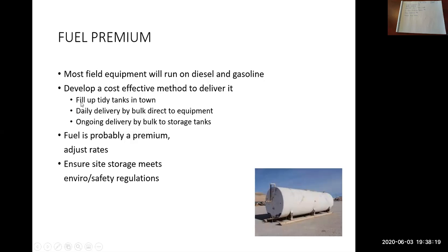So if you only have a small number of pieces of equipment, do you have a designated person with a tidy tank, as they're called, in the back of their pickup? Do they drive into town, fill it with diesel or gas or whatever you need, and then drive back to the job site and fill the equipment? Likely that has to be done daily. It's not like filling your car up where you fill it up and then you drive for a week and a half and then, oh, you've got to fill your car up again. Depending on how much you work your excavators and your dozers, you may need to fill them up daily.